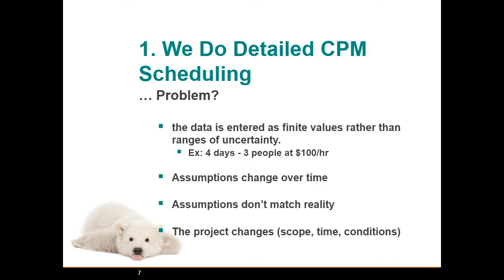And the thing is, assumptions will change over time. And sometimes those assumptions that we made when we built the estimate don't match the reality when we actually go to build the project. The project itself changes. It might change in scope. It might change in time. It might change in site conditions. And all of those things have an impact on the project that typically aren't in our original estimate.